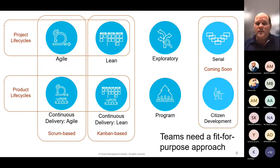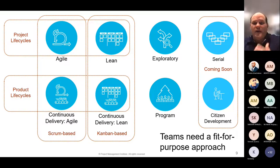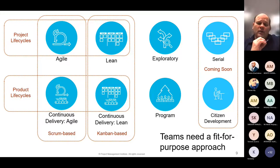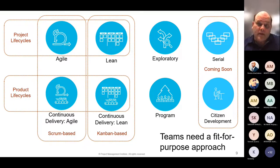We support multiple life cycles. There's an Agile Project Life Cycle — how do you run a project with Scrum from beginning to end? And a Continuous Delivery Agile Life Cycle — where instead of delivering once every three to six months, you might release into the marketplace once a week. Both are based on Scrum. We also support a Lean Project Life Cycle and a Continuous Delivery Lean Life Cycle, both based on Kanban — where you might be releasing to production several times a day.